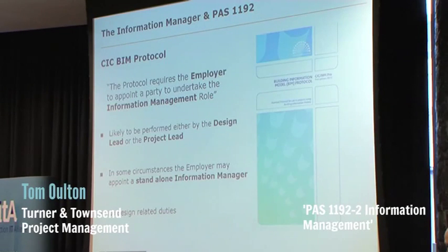No. Right, so the BIM protocol, CIC BIM protocol, is a legal agreement that is appended to the contract which requires the employer to appoint a party to undertake the information management role. There can be a role that's passed like a baton from one person to the next throughout the design process, or it can be a single person who looks after the whole process from start to finish. I'd advocate that, but each their own, it depends on the particular wants and needs of a job.